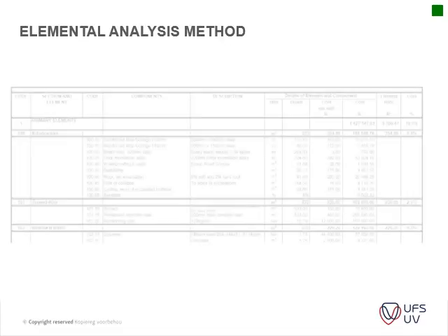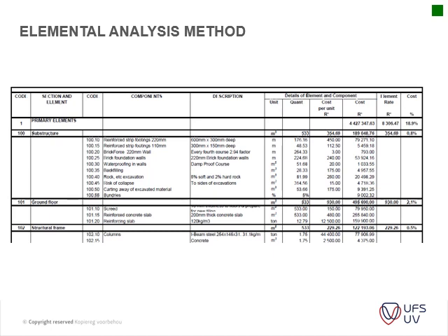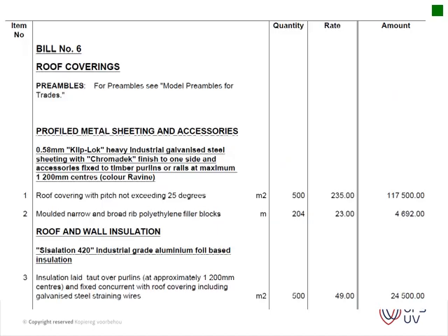So scrolling down further, this is now your substructure divided into more detail, and you can see now it's measured in different units, per meter, per square meter, per cube. You add some percentages for items that you don't really know, like hard rock, soft rock, etc. Then you get your floor construction, structural frame, etc. Okay, so not too important to know all of these differences just yet.